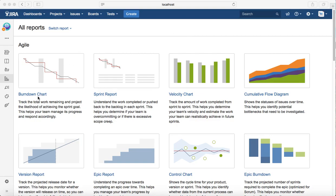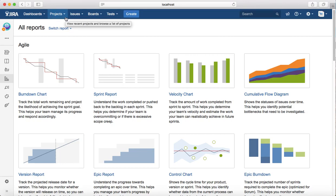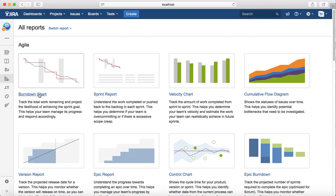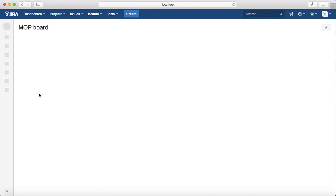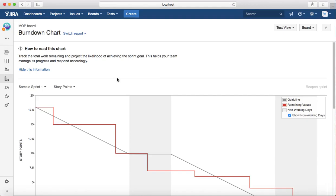To get started, you need to select the project for which you want to find the report, and then go to the reports section and click on burndown chart. It will open the burndown chart for you. You have to select the sprint, mostly the current sprint that you are tracking.